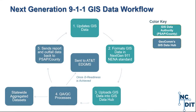Here is the initial general workflow of the data lifecycle in the Next Generation 9-1-1 project. The different colors indicate who is responsible for each step: green indicates the GIS data authority — whether the county or the PSAP — and blue boxes indicate Geocom's GIS Data Hub. At a high level, the initial GIS onboarding process begins with the GIS data being updated by the data authority. They format it in the NENA I3 standard and upload it into GIS Data Hub. GIS Data Hub then performs QA/QC checks and sends reports back to the submitting agency for review and updates. This process continues until they are deemed I3-ready — achieved when the address-to-road centerline match rate is at 98% or above and there are no critical errors.